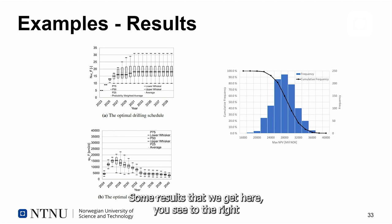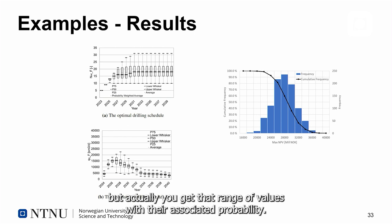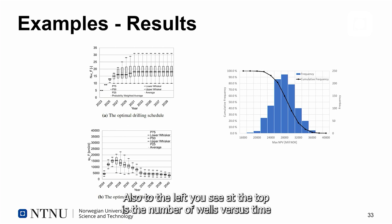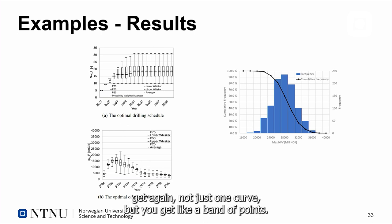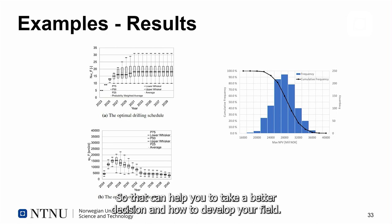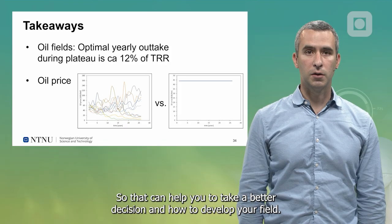Some results that we get here, you see to the right, the value of the project on the x-axis and the probability on the y-axis of each one of these values. You not only get that number, but actually you get that range of values with their associated probability. To the left at the top is the number of wells versus time that you should drill, the optimal drilling schedule. You don't get just one curve, but you get like a band of points. At the bottom you see the rate of oil with time. That can help you to take a better decision on how to develop your field.